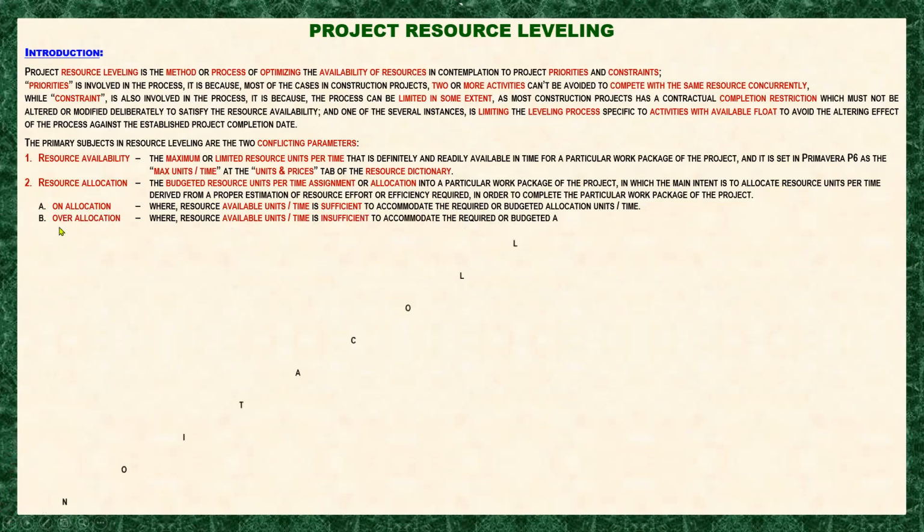Next is the over allocation. So this is where resource available units per time is insufficient to accommodate the required or budgeted allocation units per time. So meaning if your available resource in hand is not sufficient to accommodate the required or budgeted resource units per day.